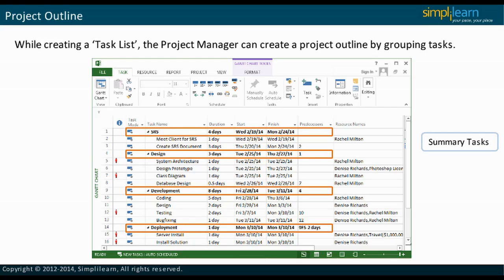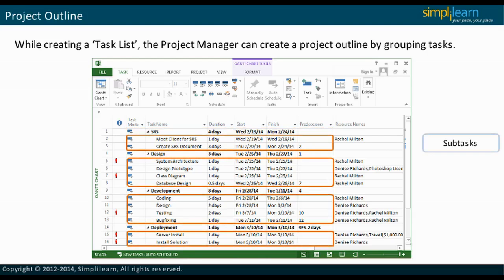This title is called a summary task. In Microsoft Project 2013, summary tasks are easily recognized as they are in bold. A summary task encapsulates the details of all its subtasks. A summary task consists of several subtasks. In Microsoft Project 2013, subtasks are indented below the summary task that they belong to.